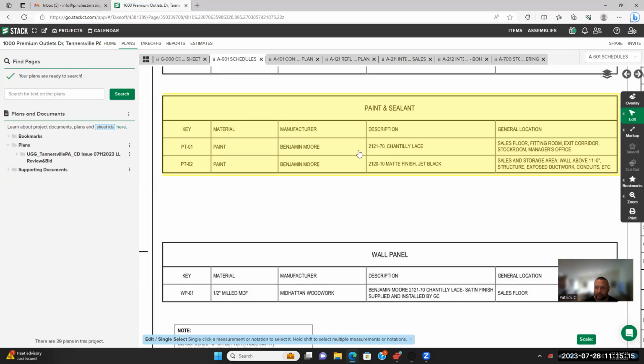So we don't have to sit there and spend time taking those things off. Don't put the switch plates on, that's what this means, before we paint the walls. Why? Because then we got to take all the switch plates off before we paint, right? So, and that's what that kind of means.